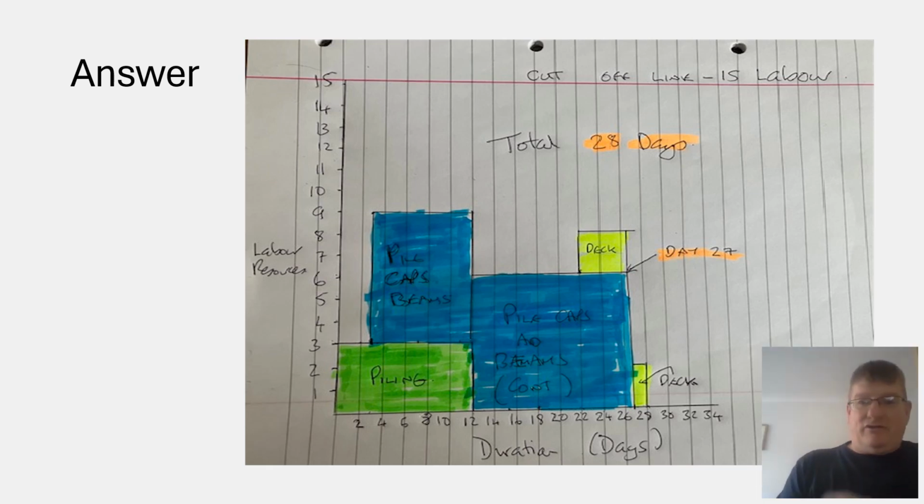All right. And the operations, if you think of a Gantt chart now, some operations, or all three operations, are running concurrently. Okay, so you don't finish one and then start the other, like a lot of you got. You can run them concurrently. The bars will be concurrent. You don't run them at the same time, but you can run them at the same time as long as one starts after the other, and you can time when the other one needs to start and how they all sequence together. I hope that makes sort of sense.